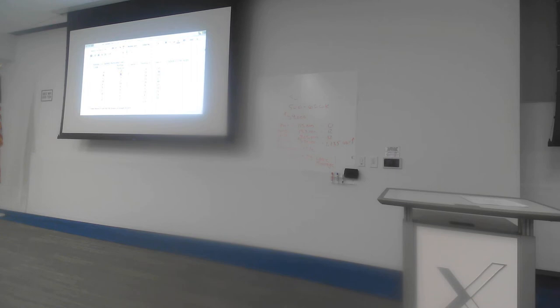Let's look at activity B. Activity B, I've got a normal duration of 8 days. Having looked at it a little bit closer, I can possibly crash it down to 6 days if I absolutely need to. But that's it. That 6 days is the limit. For whatever constraints are on that activity, I cannot crash it down below 6 days. It's just not possible to do that activity in less than 6 days. And then one more example is down here in activity H. Activity H, the normal duration of that is 1 day, and I can't crash it any more than that. For whatever reason, the normal duration is the actual limit in terms of how fast I can complete that task.